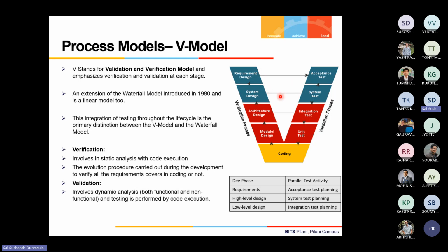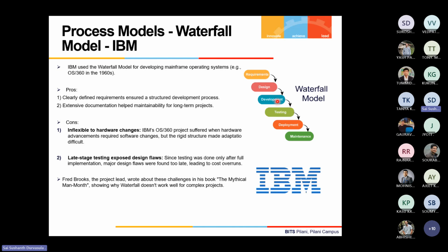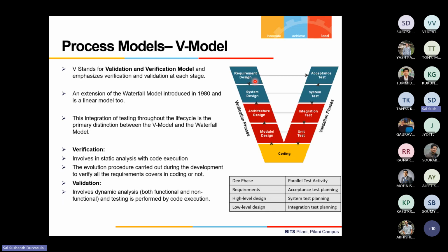And also each stage here was not being validated. It was only the development source code that was validated via functional test cases. Whereas here we are also trying to validate whether the requirements, the system integration tests and others are in place. So it's more robust and more focused on having the validation done for each stage, and at the same time put in effort in parallel and not wait. So slowly from this being sequential, we are trying to move more and more towards having some things done in parallel and do better at this.